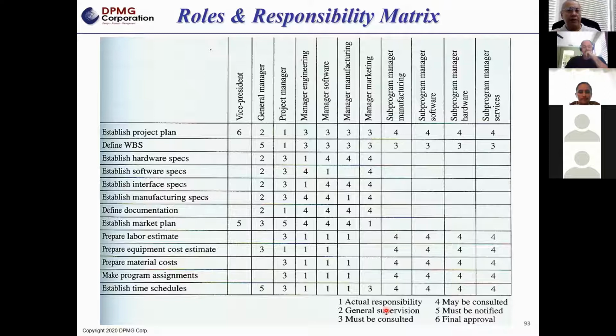In the same box, I always put a slash, whether it's a number or a letter. So let's say responsible, that's R slash D, doer. They're responsible, but they're also doing the job. That actually makes it easy for me, because you're assigned responsibility, but you're also doing the work. But if I don't see the D in that box, then you're not the one doing the work. Someone else is doing the work.